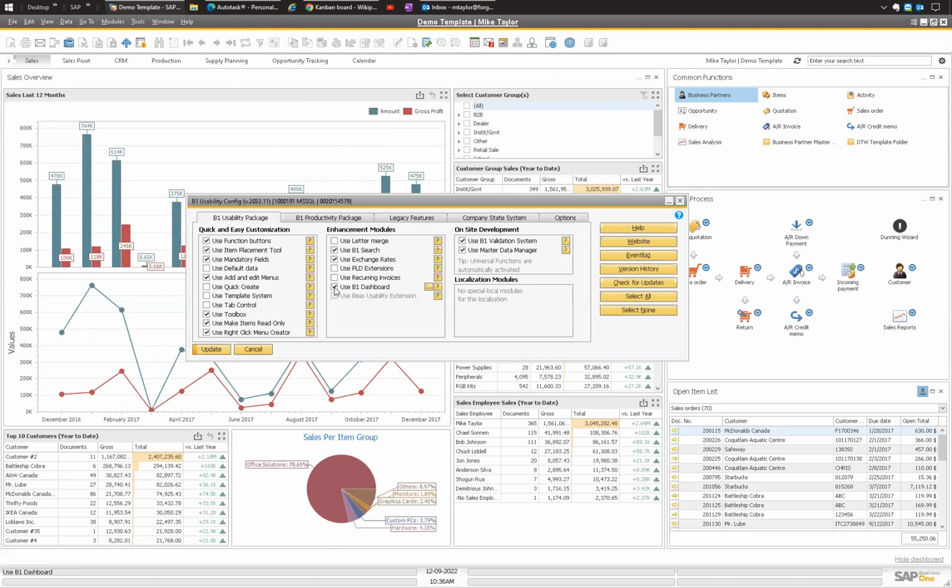If it's fully unchecked, best practice is to back up your database after hours when there are no users, back up the database, check the box, push update. You'll see a bunch of status bar updates like adding fields, adding tables. Fundamentally, a customer can do it. Like you could do it yourself.